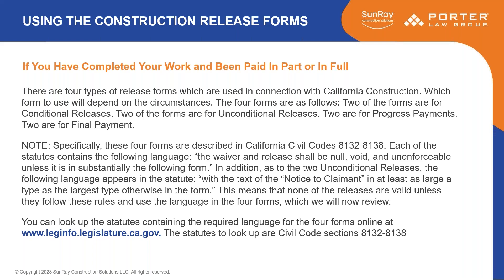In addition, as to the two unconditional releases, the following language appears: the text of the notice to claimant must be in at least as large a type as otherwise on the form. None of the releases are valid unless they follow the rules — don't try to hide things or have language in small print. If you want to look at the forms, you can access them on our website porterlaw.com. You can fill them in on screen, print them out, sign them — it's really easy to do and they're all free.